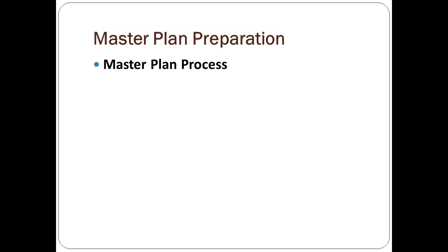In other words, if the church cannot afford to build everything in phase one, the first phase you're going to build of the master plan, it's what you're building next, then it can roll some of that need by priority into the second, third, and fourth phases.